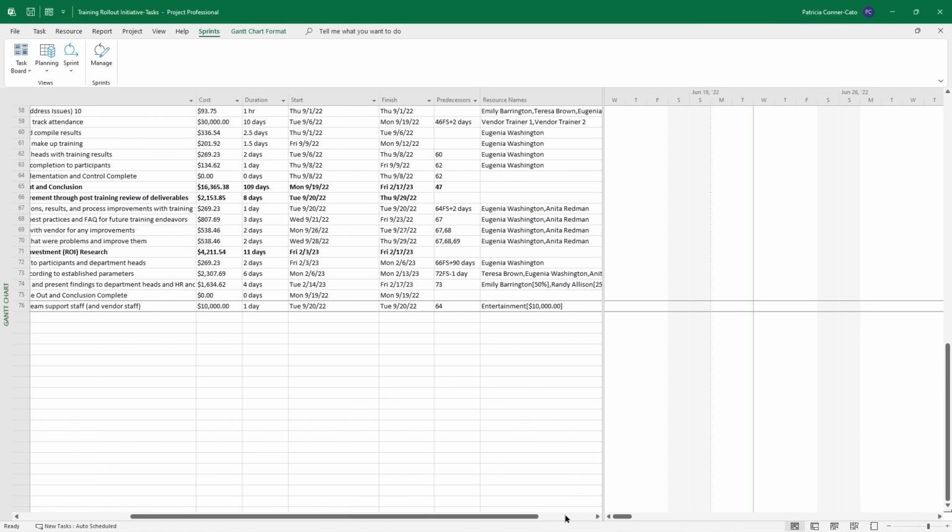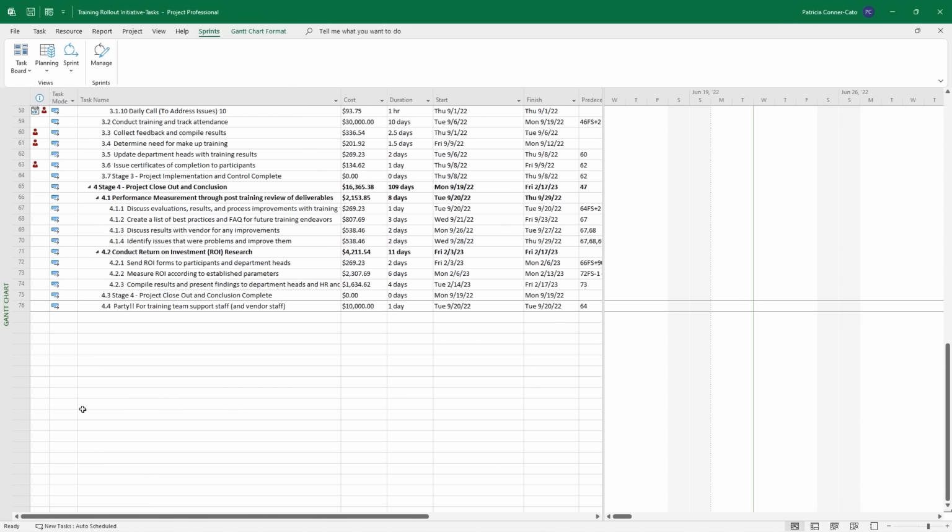what it does is only helpful after the fact, right? So it will put an indicator, a green arrow on your Gantt chart for the deadline date. And if you blow past the deadline, that arrow will turn red and you'll get an indicator in the indicator column.